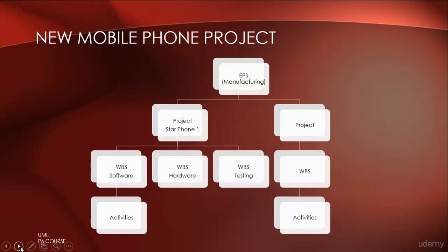So the activities will sum up to their parent WBS, the parent WBS will sum up to the higher WBS and finally to the project level. In our next lecture, we will know how to create a project in Primavera P6.